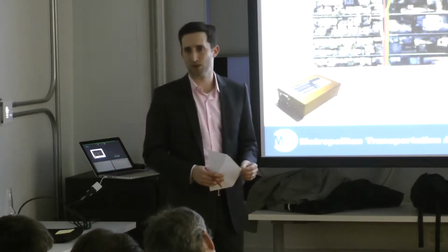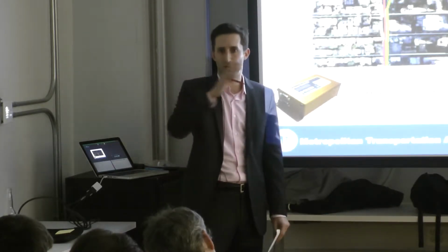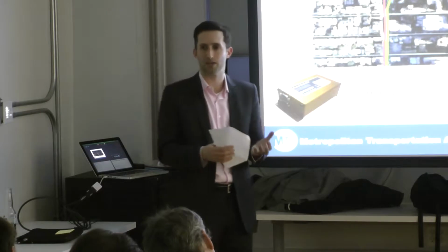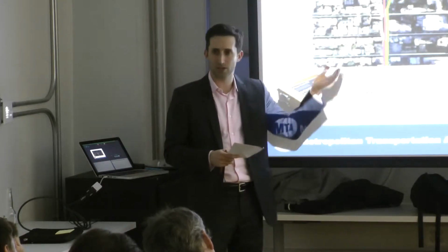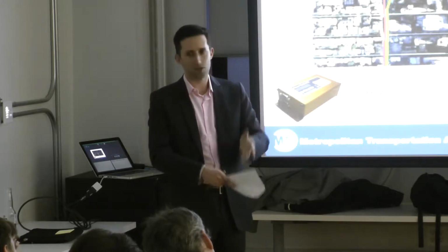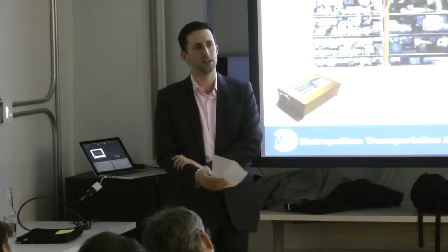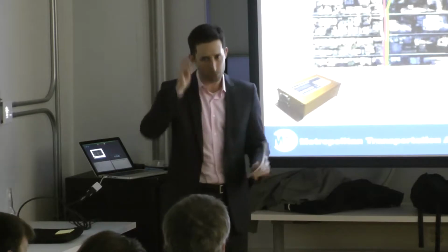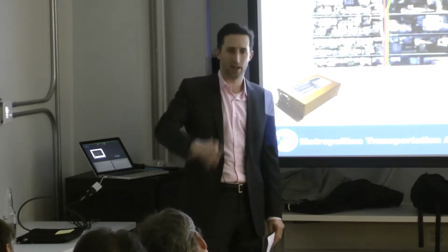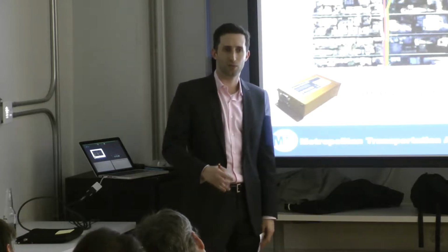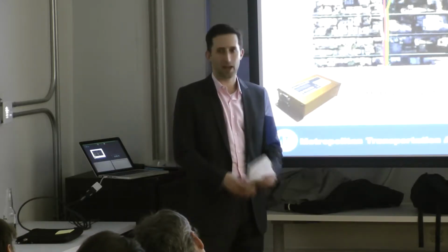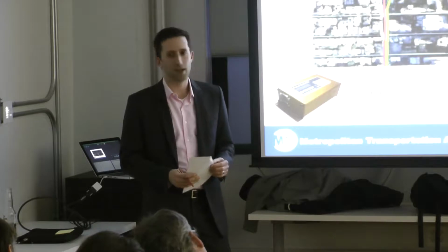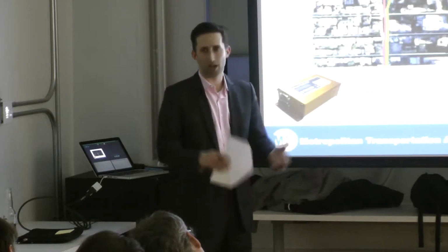Whereas typically when a system like this is rolled out, there's a long period of getting up to speed, educating bus operators on how to log into the system, and how to do this and that, and a long period of breaking in the system. Whereas for our project, for Staten Island, like I said, we basically started the production work to procure and deliver Staten Island in February or March of last year, and we launched it the first week of January of this year. And in the most literal sense, we launched the project on the absolute soonest possible day that it was even remotely launchable, without any kind of ramp-up period for the operational staff to figure out what they need to do to make it work, etc. And that was largely because of the work we did to build in the tolerance for just messy everything.